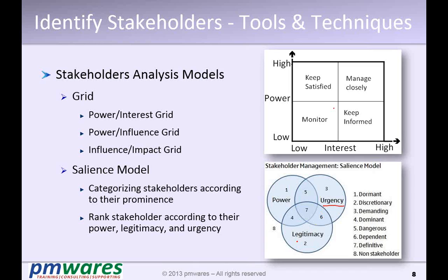The second is the person who is officially in the project, like the client project manager, who has all the legitimate requirements. The third are stakeholders who may not be engaged or urgently asking, but have a lot of power, like the vendor management team or the manager of the project manager. Then there are hybrids: a combination of 1 and 3 is 5. Normally that is dangerous, because they not only have power but are looking for something urgently. We must fulfill this immediately.